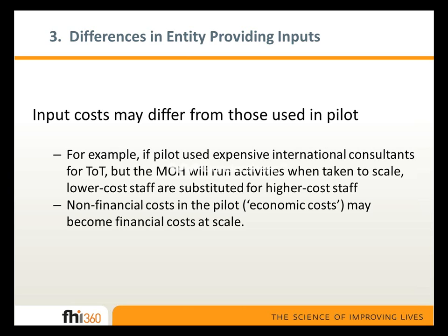Also, sometimes in pilot projects, we have resources that we don't have to pay for. There might be donated resources, donated commodities, for example. And so in this case, non-financial costs in the pilot might become financial costs at scale. It might be that once the project is scaled up, we have to actually pay for those resources that were provided for free in the pilot.